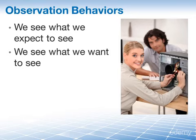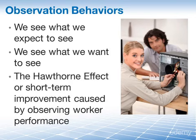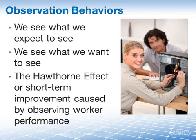And lastly, the Hawthorne effect — a short-term improvement caused by observing worker performance — is something you need to be aware of. This relates to normal human behavior: performance improves when someone observes your actions. For example, an improvement is noted during observation because the worker wants to make a good impression, but when the observation is over, the improvements fall away again. Consider all these factors before using observations to collect project requirements.